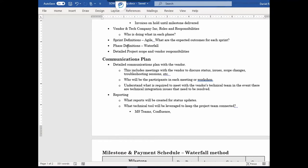The same goes for the Waterfall method — you have your phase definitions. What would indicate the end of a phase, and what is the definition of done for each phase? You also want a more detailed project scope, including a section on items that are not in scope. That seems obvious, but it will definitely lead to less misunderstanding, because the vendor may implement something you don't want.